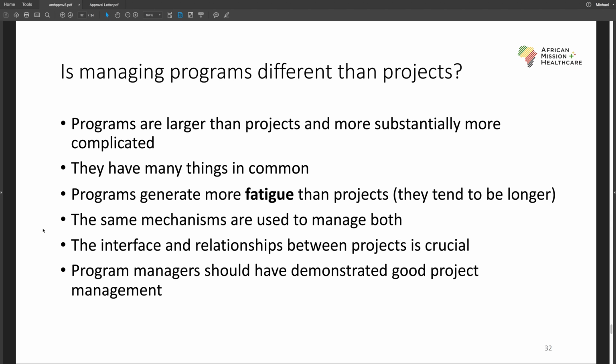So if you've got one team that's focused on building out a new physical facility on your campus, and another group that's getting the physicians and the nurses and the clinical teams ready to occupy a floor in the building to provide a certain set of services, they obviously need to be interfacing on the key topics that matter. So the design of the space, for example, or the dates on which it's ready for occupancy and when it's going to be ready for patients, all those kinds of things need to be coordinated between teams.